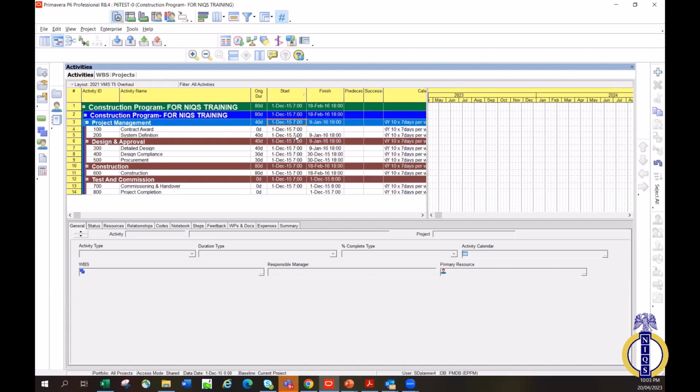It's usually a looped connection. So your schedule must be looped. That means it is permitted to have only two open ends. Please, let's take note of this. That's one of the good qualities of a good schedule, that it must have just two open ends.